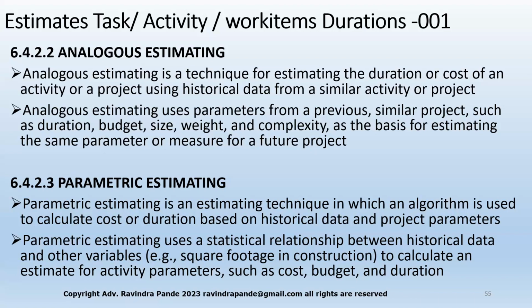So analogous estimating uses parameters from a previous similar project such as duration, budget, size, weight, complexity, etc. as the basis of estimating the same parameter or measure for the future project. So analogous talks about historical data to be extrapolated for the current project. In terms of parametric estimation,